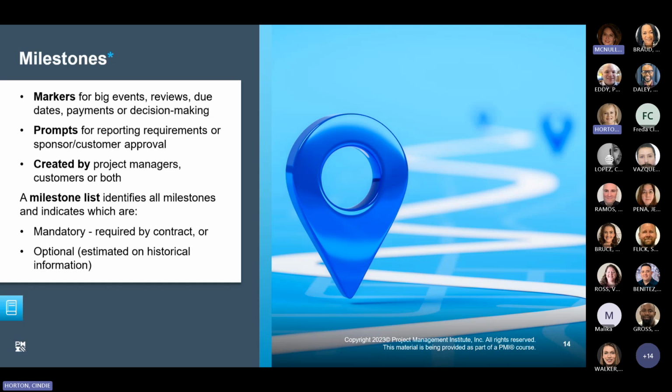The point may signal anchors such as a project start and end date, a need for external review, or input and budget checks. It is represented as a task of zero duration, and it is displayed as an important achievement in the project.